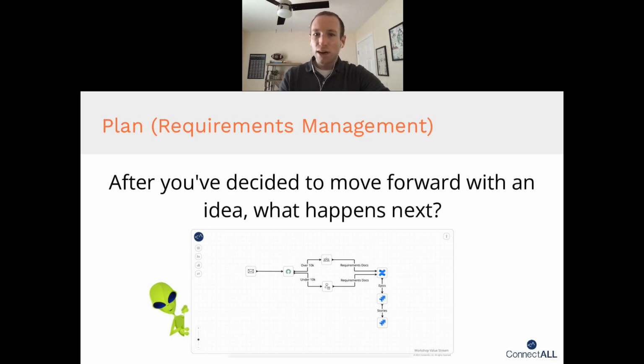And so based upon those requirements documentations, those are added into a Confluence environment. From that Confluence environment, what you can see is then the information flows from there, and those requirements documents are broken down into epics within Jira, and then broken down from those epics into individual stories for the developers, for the folks that are building out the code to be able to work on. And so that gives them targeted user stories to be able to contribute to based upon the requirements that have been set up for this individual enhancement.